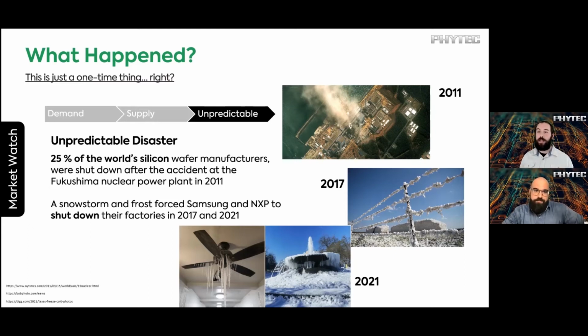It's gone. So basically, the situation that happened in Texas, you have, like you were saying, 26 to 30 weeks of production that at various stages in that 26 to 30 week cycle, all of that's gone. You have the couple weeks of shutdown, then you have 20 weeks of ramping these back up and getting them established again, and then you're going to have 26 to 30 weeks additional for new product to start hitting the market. Welcome to my world. Luckily, in Texas, it was a planned shutdown, so not everything was gone, but it was not good. And it did contribute to the overall market situation that we basically don't have parts.